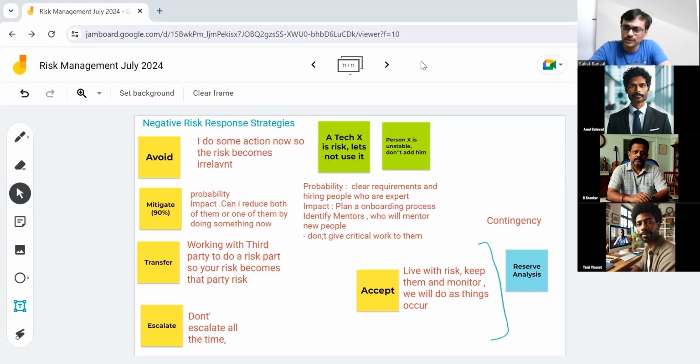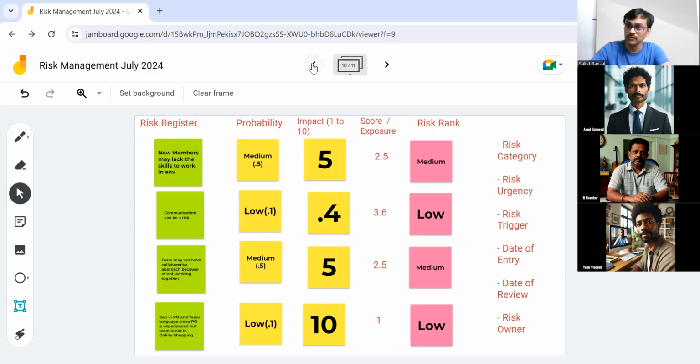They just use judgment. In a PI planning meeting, we discuss some risks and then say it's resolved or owned, but they will not talk about doing probability and impact analysis, identifying what can be resolved, what should be mitigated, what should be accepted. So there is no guidance. It's a judgment. We can informally have an understanding of what should be accepted, resolved or mitigated, but there is no clear-cut definition for it. That's the difference.